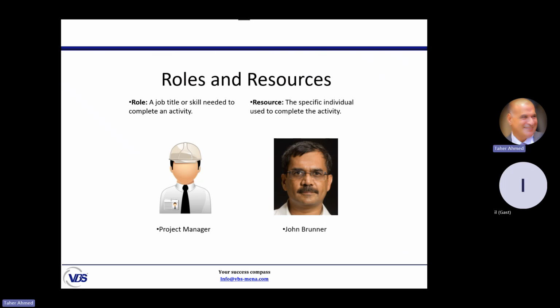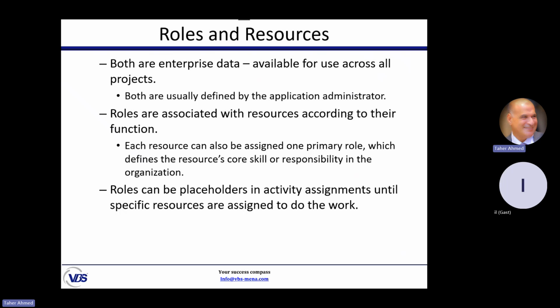Why do we have to define roles? Why does Primavera define roles first? In some cases, especially at the planning stage, you don't know exactly who will do the job. That's why it's better to assign a job first, then use the job as a placeholder to replace it by a resource. Both roles and resources are enterprise information, and it is not your job to do it. When you work in a big company, the administrator of the company will be responsible for defining roles and resources.